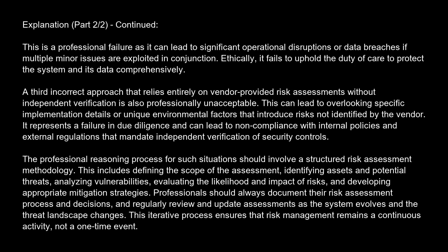The professional reasoning process for such situations should involve a structured risk assessment methodology. This includes defining the scope of the assessment, identifying assets and potential threats, analyzing vulnerabilities, evaluating the likelihood and impact of risks, and developing appropriate mitigation strategies. Professionals should always document their risk assessment process and decisions, and regularly review and update assessments as the system evolves and the threat landscape changes. This iterative process ensures that risk management remains a continuous activity, not a one-time event.